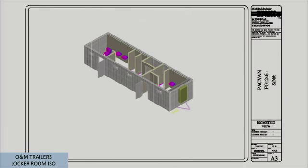I did want to call out just one thing for the Plan Commission to consider, and that is that all of the structures being presented do not meet the architectural standards for building materials. In other words, they're all going to be constructed of metal. So that would require a 3/4 majority approval of the Plan Commission this evening. And the staff recommendation is for approval with the condition that all building and fire codes are met.